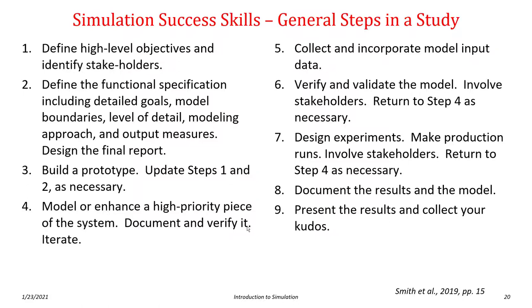Step 4, model or enhance a high-priority piece of the system, document it and verify it, and then iterate. So this is an important concept in building simulation models of complex systems, that we follow an iterative process, successively adding more detail to the model. Collect and incorporate model input data, verify and validate the model, and involve the stakeholders in this process so that everyone is in agreement that the model is correct. As part of this verification and validation, you might have to return to step 4 if you decide that it's not valid or you have left out key components.